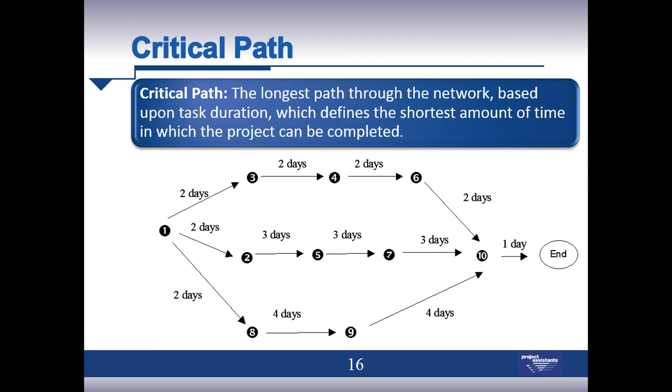We're going to share, looking at the critical path. There's the definition. I assume most of you are familiar with it. But managing the critical path is so important. Not only managing the critical path, but managing the near critical path. So to break it down simply, the critical path is essentially saying that any task that finishes late that's on the critical path will cause the entire project to be late.